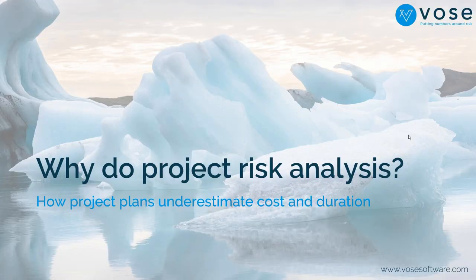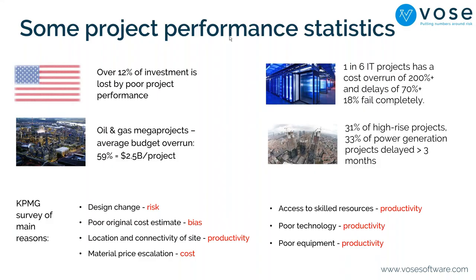The first question is: why do we do project risk analysis? The basic reason is we want better estimates of the cost and duration of our project. A few alarming statistics: over 12% of investment is lost due to poor project performance, and one in six IT projects has a cost overrun of 200% or more, with delays of 70% or more, and 18% fail completely.